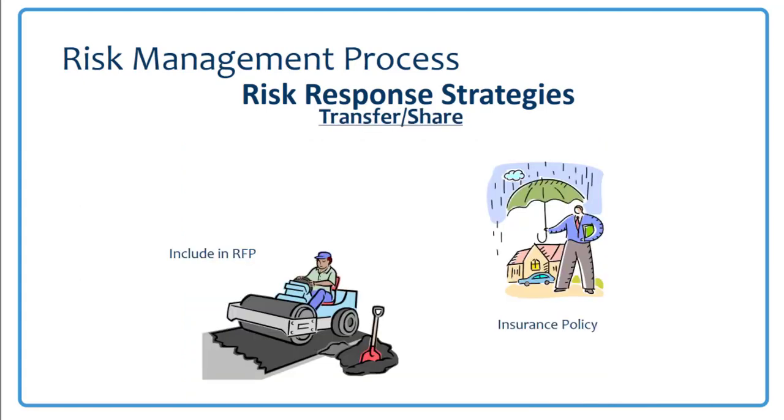The next response strategies are transfer or share. If it's a threat, you're going to transfer the risk, which means you move it to another party who's more capable of handling the risk, such as the contractor or an insurance company. If it's an opportunity, you want to share, which means assigning ownership of the opportunity to a third party who's best capable to capture the benefit of the project.